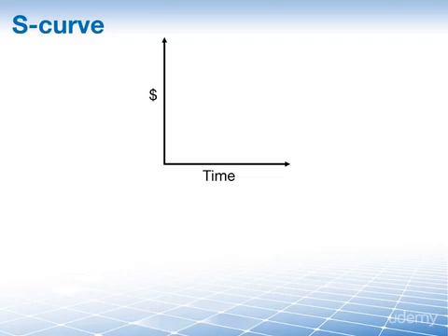The block diagram we just saw was concerned with only a single dimension, namely the total amount of dollars in your budget. Let's add another dimension to this. Can you guess what dimension we're going to be adding? Well, we already said that determine budget is all about when. This means we have to consider time in all of this. The cost baseline is usually shown as an S-curve, like this red S here.